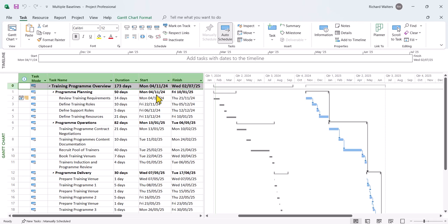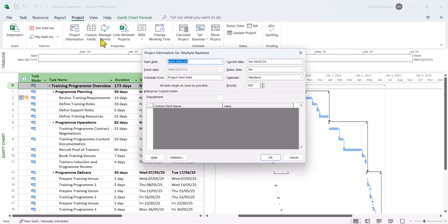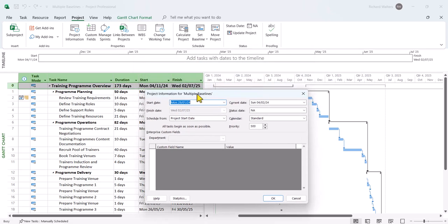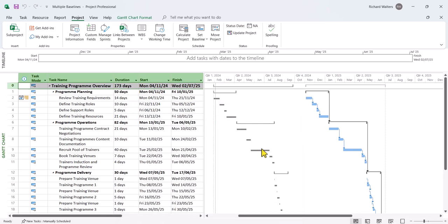Now this project was due to start at the end of January and we can see that with the baseline graphic. It's back here in January. If you wanted the exact date, because I've changed the time scale, we can't see the exact date, but we can through the project tab and project information. So the project was due to start on the 29th of January, but now we've delayed this training program by just about 10 months. So the baseline we've now set is of no use whatsoever because the best we can do now to start this training program project off is the 4th of November. So right now, the baseline we have is of no use. So this is where, in this kind of example, you might need to set a second baseline. And that's what we're about to do now.